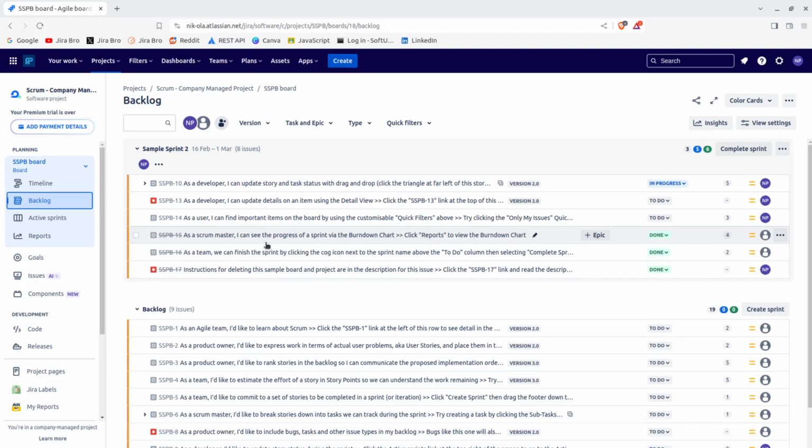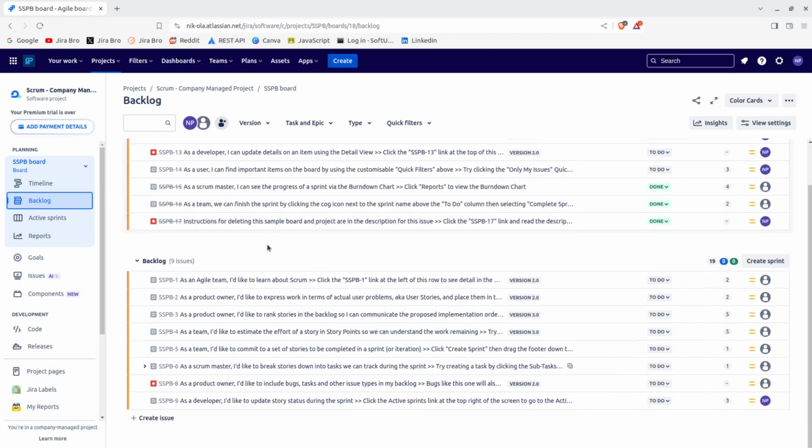Now, when it comes to Scrum, you have something that is called the sprint backlog, right? Because you all know that Scrum is based on sprints. And within the sprint, there is a time period in which the team has committed themselves to finish some amount of work. Now, one sprint should not be longer than 2 weeks. That is the base rule, because it creates questions like why some sprint is longer than 2 weeks.